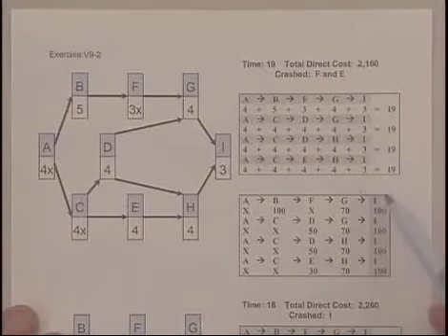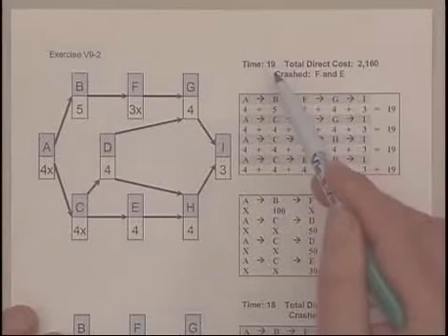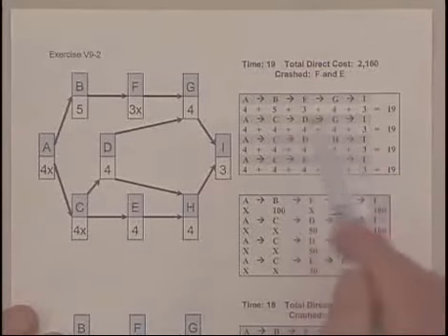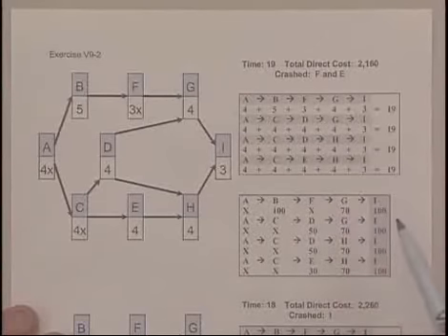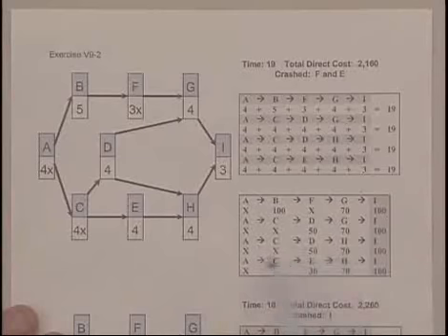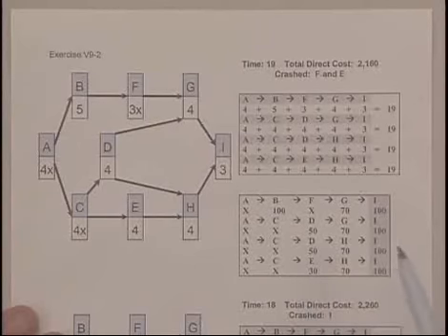So now we have to influence all four paths in order to go from 19 to 18. Influencing just one won't alter the duration of the project. All four have to be affected. So I've drawn out the options here. B is 100, D is 50, H is 70, E is 30.